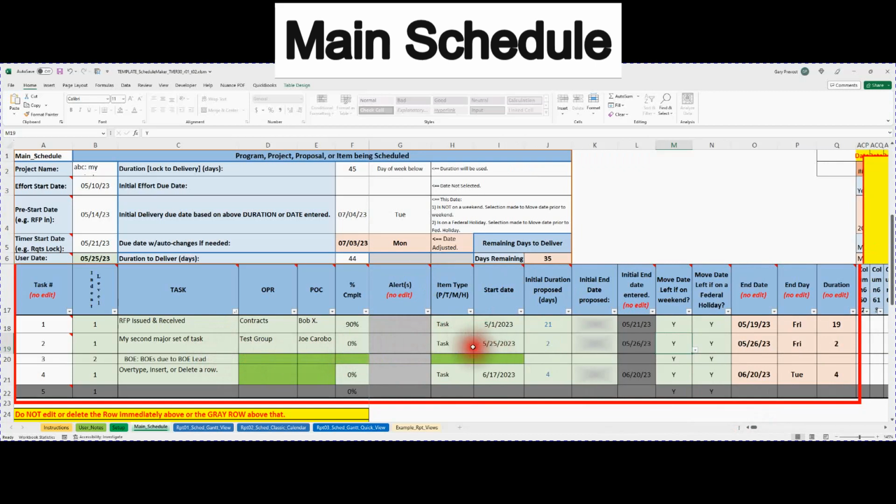There are some advanced measures you can take, such as you want to have a start date relative to another date, and we're going to cover this in some of the advanced areas. Let's say you want to have it start X number of days after the top date. So we're going to go through this further, but just to show you real quick, I can say equals that date plus its duration. The problem with this is it may end up putting it on a weekend or holiday.